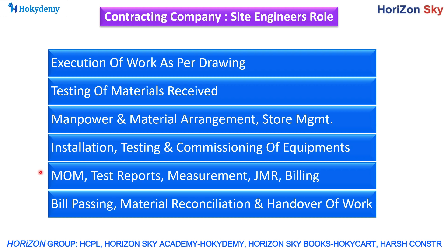The site engineer must ensure different test reports are documented and submitted as needed — for machines, equipment, materials, or services. Measurements are also taken constantly: for civil engineers during foundation work or superstructure casting; for electrical engineers when laying out cables, filling RDS, and preparing cable schedules; and for mechanical contractors when measuring pipes and fittings.